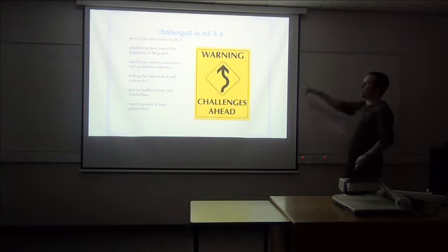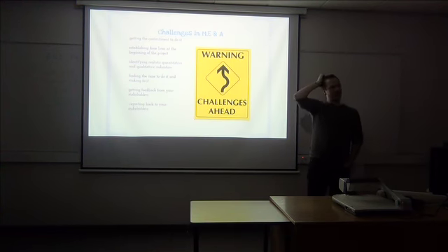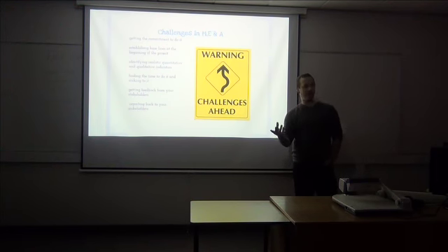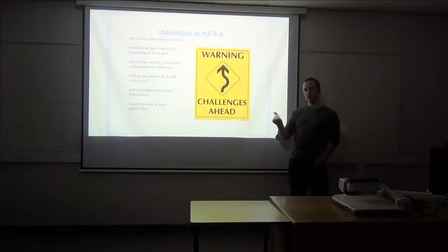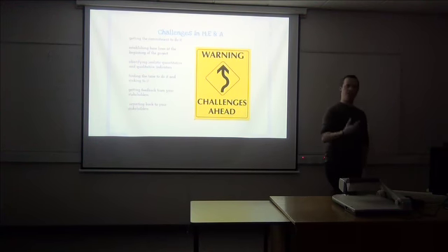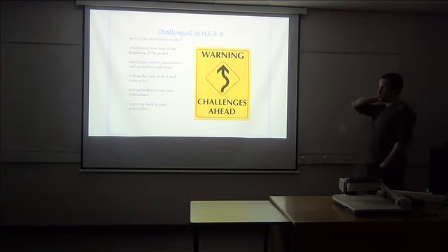You have to establish baselines. So what is sustainable and what is not? So we're reducing water use. So what is a good use of water? You know, what's the baseline for my project in my industry? You have to know what they are. It's no good just putting an arbitrary figure out of the hat. You have to know what your industry is doing and try to beat the kind of best practice. And sometimes that isn't always readily available.